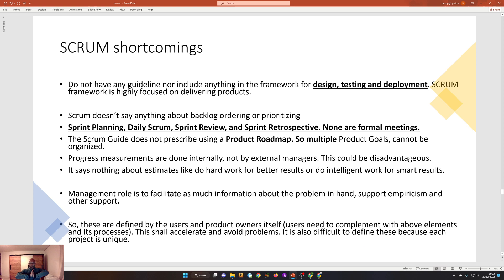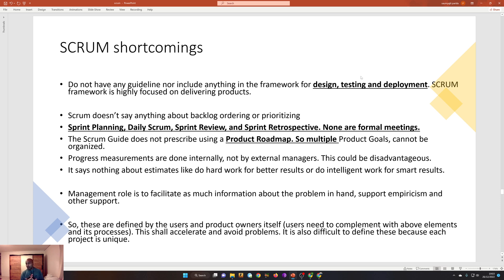We discussed all the good things about scrum, but there are shortcomings too. The most notable is that scrum doesn't have any guideline for design, testing, and deployment. For example, if you are making a big application, scrum can be applied only to making that application — scrum doesn't say anything about design, testing, or deployment. It is highly focused on delivering a product, so making a sprint of design is not supported by scrum.